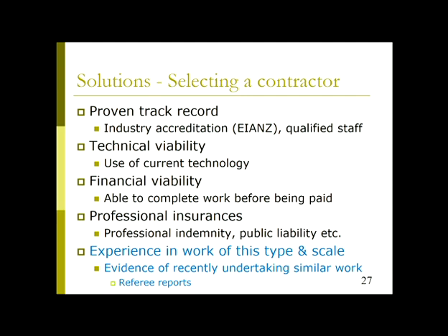Were they similar to the one that you want them to do? And very importantly, is it of a similar scale? Because expecting somebody to step up from a $10,000 project that's similar to yours to the hundreds of thousands of dollars project that is yours is a very big transition, even if the projects are very similar. And so you want evidence of them doing work that's of a similar scale.